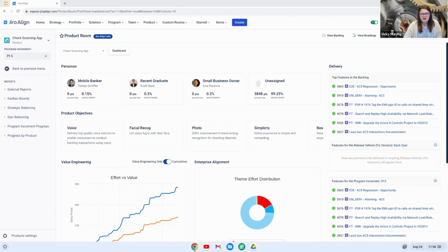All right, so we already have Jira Align, but we maybe missed some opportunities in our rollout. For example, we aren't doing great at tracking dependencies. Can we just start doing that now? Yes, you can. So under the admin settings, you can actually customize what types of dependencies you allow. I always recommend starting there, really looking at what types of dependencies really exist across our organization and enabling those types. And then, yes, you can just start tracking dependencies at any point. Make sure you have your permissions set up correctly. And then I always recommend define your process, publish it where everyone can access it, and then go for it. And always come back and iterate. When we're talking about Jira Align, we're talking about trying to be agile. So come back and iterate on that process as you learn more about it for your organization.